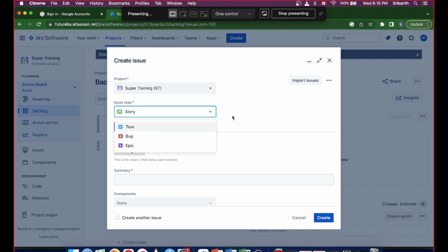And task also I was explaining yesterday. In some companies, for stories, the scrum master or the BA or the dev can create different tasks, one task for testing and one task for development. When dev is done, he'll mark the task as completed, and when the testing is done, the tester will mark the task as completed for those stories. The story should be accepted only when all the tasks under it are completed, if you are following the task convention in your project.